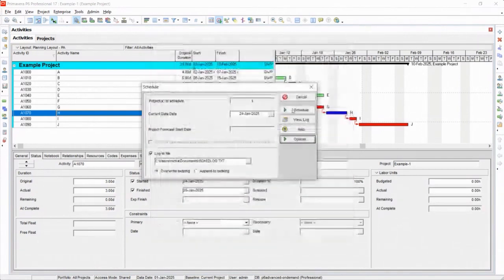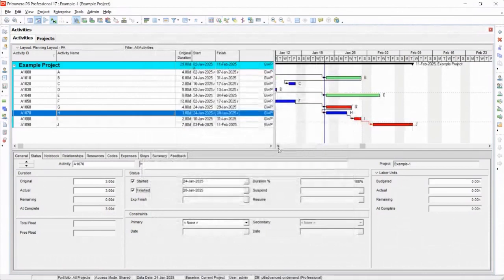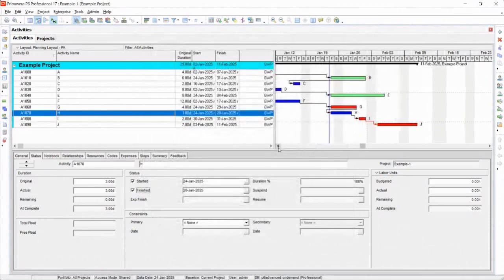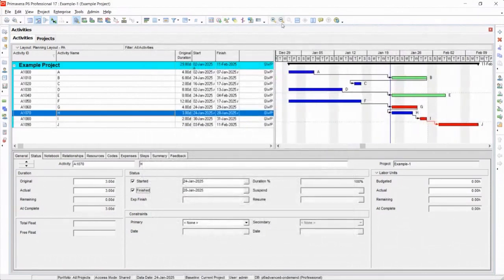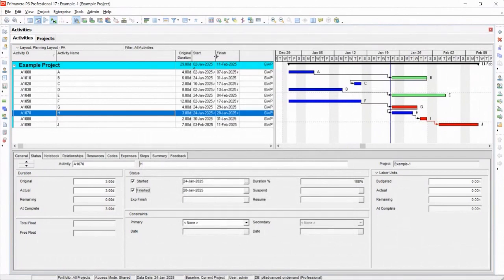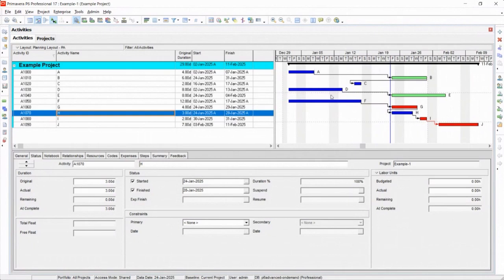Retained logic is on. So watch what happens. Let's review. Retained logic means retain the logic links that are in your schedule to make sure that you follow them. And I did not follow the logic when I updated the schedule.